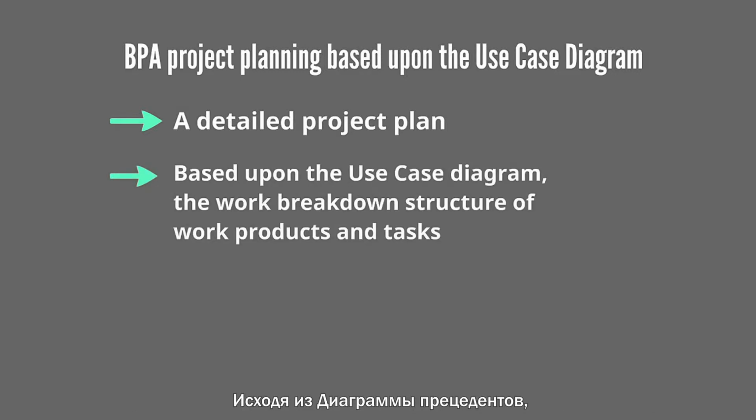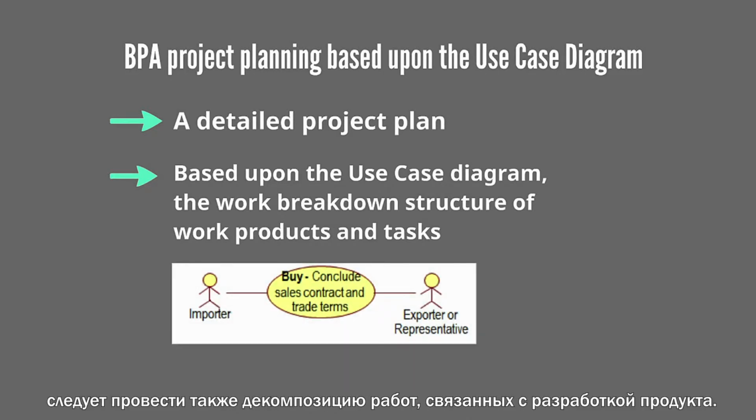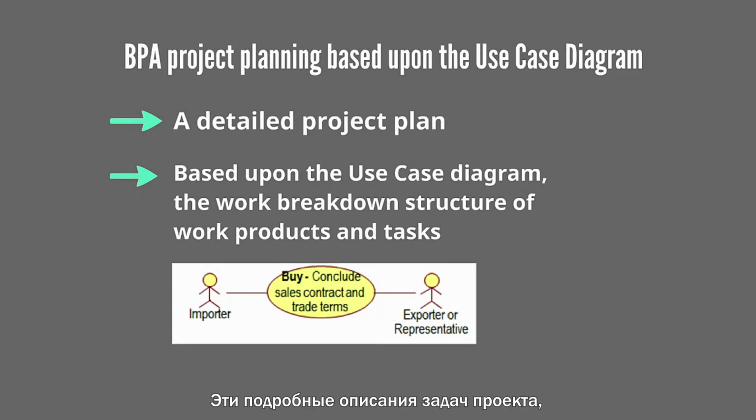Based upon the use case diagram, the work breakdown structure of work products and tasks shall be developed. These output-oriented descriptions of project tasks as summarized in the work breakdown structures then serve as a basis for project timeline, cost and effort estimation, and scheduling.